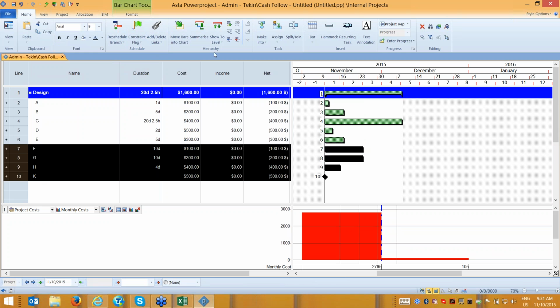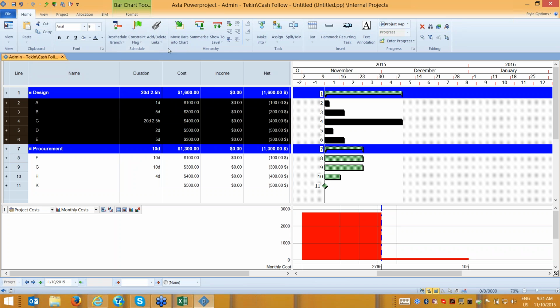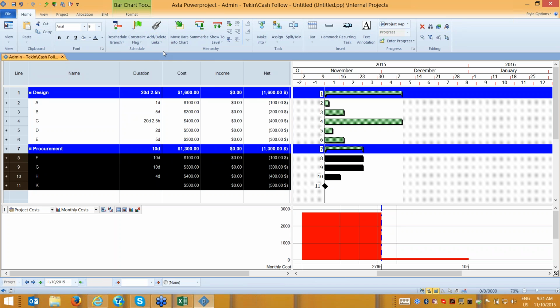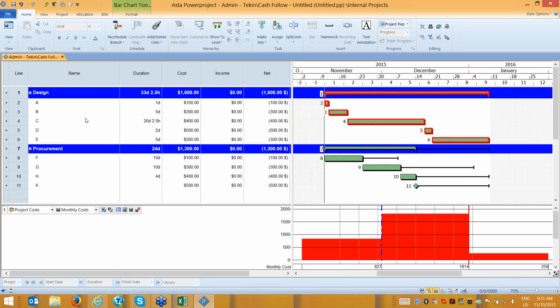And from K to F, I also want the design as, let's say, procurement. Okay, and I can select from A, B, C, D, E, and I can say link those tasks. I can also select here, and I can say also link those tasks, so that activity A will finish, then activity B will start. When I schedule it, you can say that these are the design works, these are the procurement works, and here